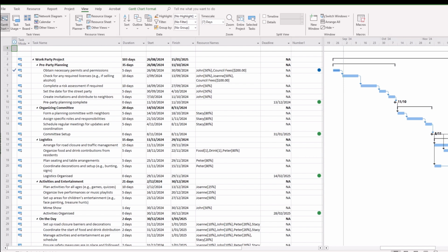Prior to setting a baseline, it's best to ensure that you've done the majority of your work in your project schedule. That obviously would include ensuring all your tasks and summary tasks are neatly in order, your predecessors and linkages between tasks are complete, and the completion too of your assignment of resources within your project. So at this point, we've done that here in this particular example project.